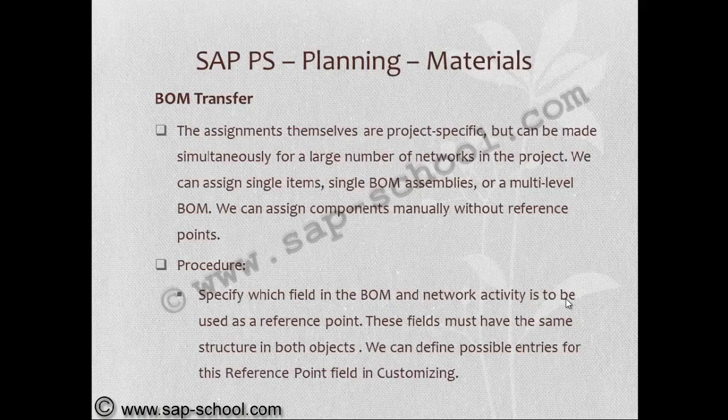The assignments themselves are project specific but can be made simultaneously for a larger number of networks in the project. We can assign single items, single BOM assemblies, or a multiple level BOM. We can assign components manually without reference points.